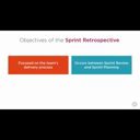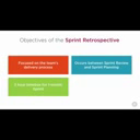The Scrum framework also specifies that the retrospective should be time-boxed to 3 hours for a 1-month sprint, but it may be proportionately shorter for shorter sprints. Since I like to encourage teams to leave themselves plenty of space to consider any improvements that they may want to attempt as a team, I recommend that you time-box your retrospective to 2 hours.